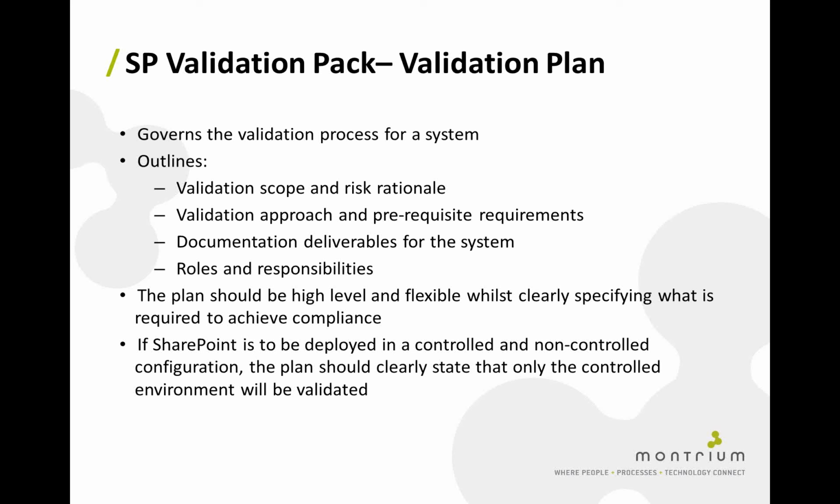Now the plan, it's a bit like an SOP. It should be high level and it should be flexible whilst also being very, very clear about what's required to achieve compliance. You should also state very clearly, if you're going to be deploying SharePoint in a controlled or regulated and non-controlled or non-regulated configuration, that the plan only applies to the controlled or regulated environment. We're not going to be validating the non-regulated or non-controlled environment because we don't want that environment to fall under change control for practical reasons.